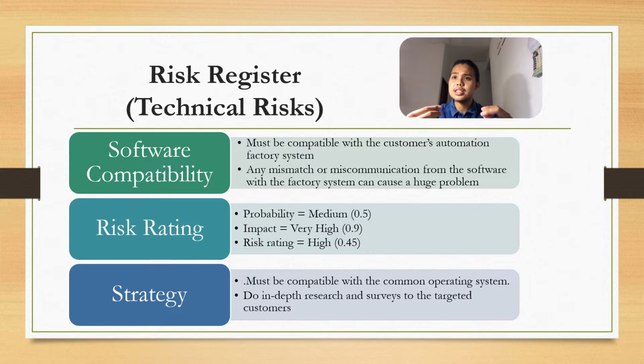And the strategy to avoid this risk is that the company must make sure the software that we develop is compatible with the most common operating systems such as Windows, Android or iOS, and we also need to do in-depth research on the targeted customer so that our software can easily match their system.